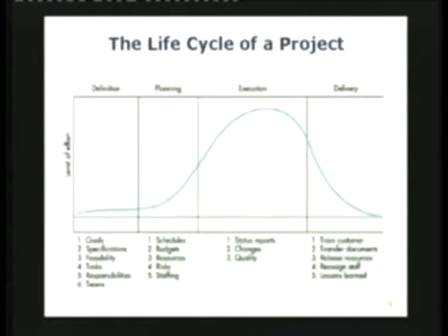Before you deliver, when your execution is complete, you have to make sure the product or the service is certified to be okay by the site inspector. And of course, handing over is when you shake hands with the customer, you collect your check, and you make sure that everything is in order the way it was supposed to be. The product life cycle begins after this. So when the project life cycle ends, that's when the product life cycle begins.